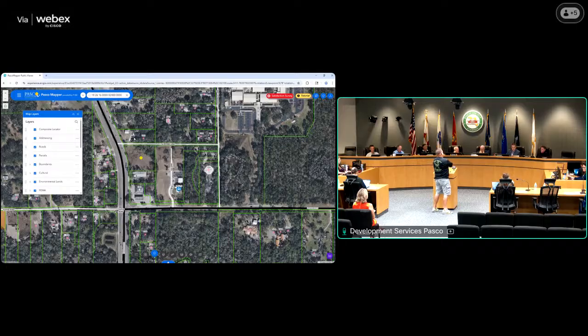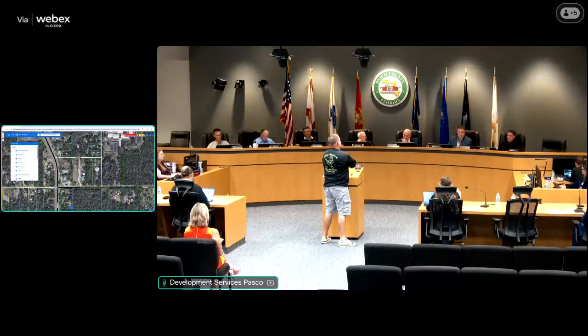Also, very common. I have to ask Mr. Girardi because I think he was the engineer for that system. But it's not uncommon. Go to the water management district and get a permit for a retention pond, if there are nearby septic systems, they ask you to provide a groundwater mounding analysis that demonstrates that the groundwater mound created by the retention pond does not intercept or interfere with the operation of the septic system. That's also common with wells too. Yeah, because my well's also, I think, 150 feet. And I can't speak to the specifics, but I think Jamie did design that.